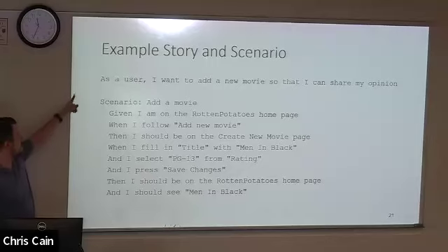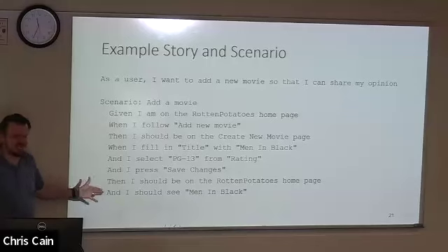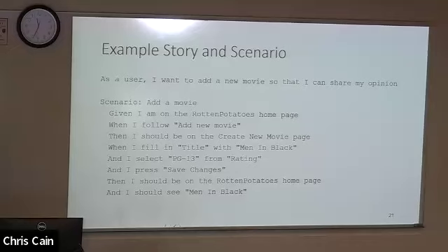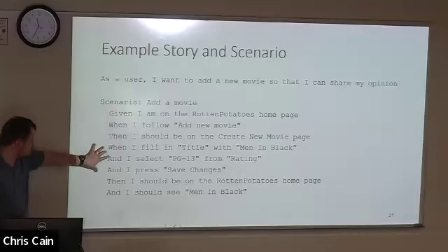All right, we're going to take this client-centered language and create some kind of technical process out of it. How do we start? We start from their perspective. Given that I'm on the Rotten Potatoes homepage, when I click on or follow add a new movie, then I should be on the create new movie page. Another scenario, so this one user story has multiple scenarios associated with it.